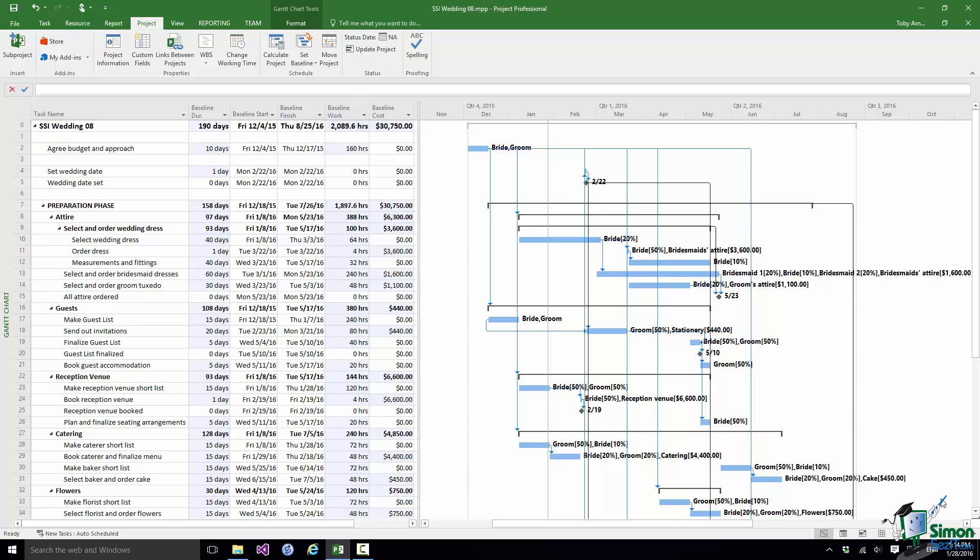The reason that I want to look at the critical path now is because as we start to track progress on a project it's very often the case that things start to go wrong. Things get delayed, they take longer than expected, perhaps costs increase. And at any one time you may need to get back to a situation where you are saving time and making up for slippage on a project. When you need to make up for slippage what you really need to know is which tasks are really driving when this project is going to finish. The set of tasks that determine when a project is going to finish is called the critical path, and the tasks within the critical path are usually referred to as the critical tasks.